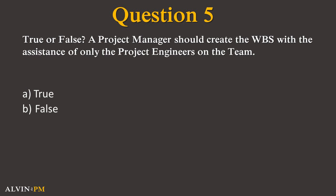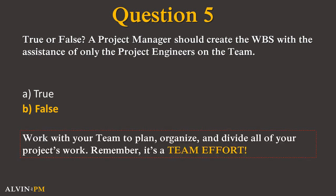Question 5. True or false: a project manager should create the WBS with the assistance of only the project engineers on the team. The correct answer is false. The project manager should work with the entire team and other stakeholders as needed to develop the work breakdown structure. To make sure that you cover the entire scope of the project, you want to work with all key members on your team to plan, organize, and divide all of the work from your project. Remember, the WBS is intended to cover 100% of your project scope. Anything outside the scope of your project will not be covered in your WBS.